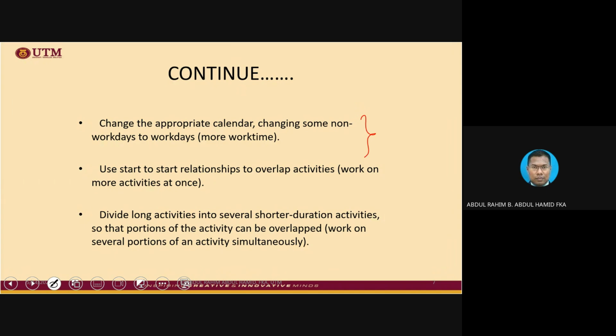The rest depend on the organization, whether they want to take up that holiday as well. But if you are running short, why not use those public holidays? Of course, you need to pay money. So that is what the project time-cost relationship is all about. Sometimes you want things fast, but you are going to sacrifice on additional costs. That is very common sense anyway.